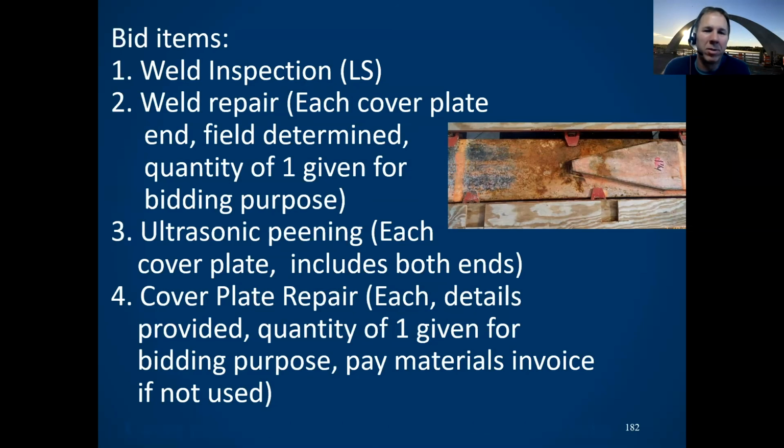The third item associated with these is ultrasonic peening. That is a specialized tool that comes in from Georgia. It's kind of a proprietary thing, but they get paid per cover plate. So for that cover plate you're looking at, there's one end of it, and there's another end. They'll run longitudinally along the girder, and the other end as well is included in the price bid. I'll show you a slide of that coming up.